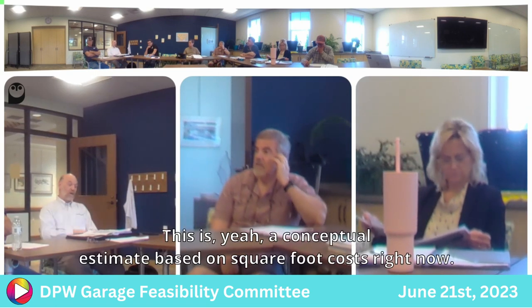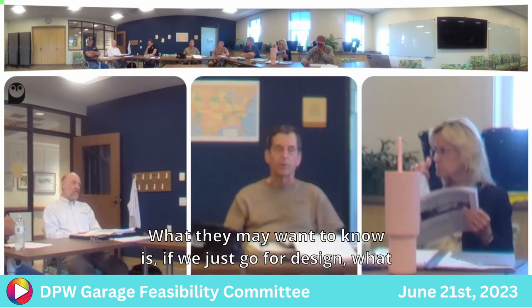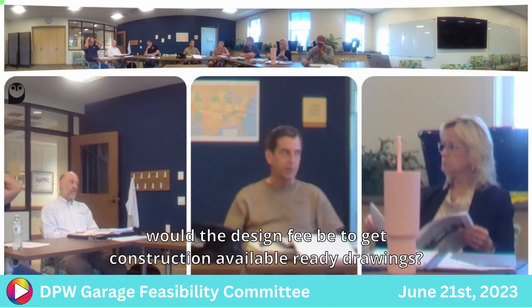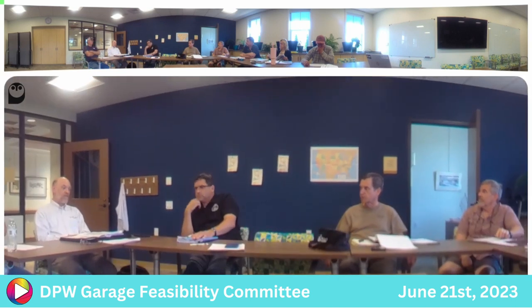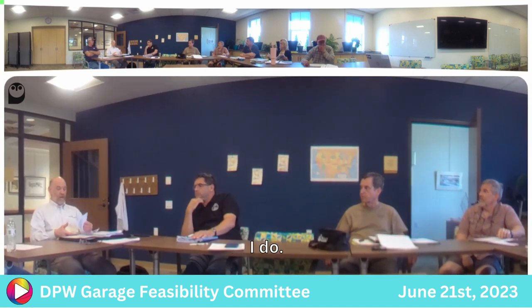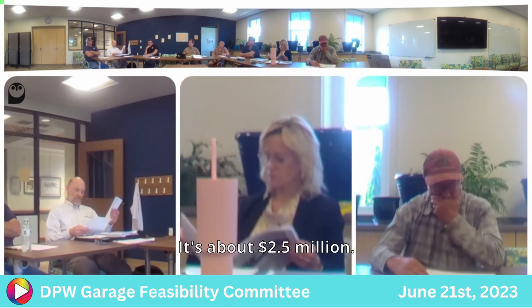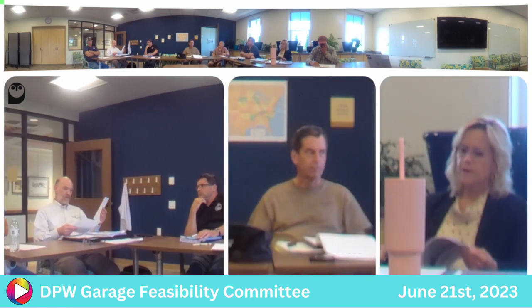This is a conceptual estimate based on square foot costs right now. What they may want to know is, if we just go for design, what would the design fee be to get construction-ready drawings? You've got enough for that. I do. It's about $2.5 million. Something like that.